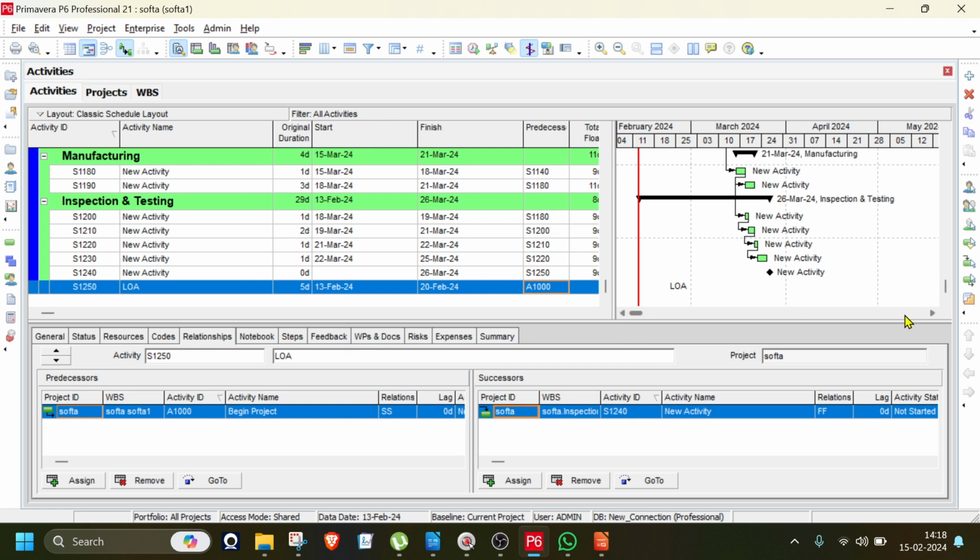Don't forget this. Because normally internally, the accounts can come and ask you, give me those 5 activities. After the 5th activity, there is a level of effort for a meeting. So we have to calculate from the first activity to the 5th activity. So it normally comes like this. Always remember the predecessor of the activity starts as a start to start relationship, and the successor ends up as a finish to finish. Don't forget this. Will you forget? No. Okay. So I calculated this.